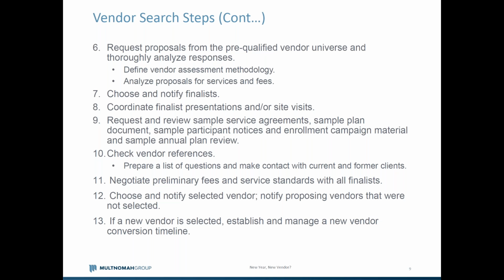At that stage, it's also important to request and review any sample service agreements, plan documents, participant notices, and some of the other materials that are important in that. Service agreements are an area of particular importance, in some cases getting your legal group involved that may not be involved in the vendor search to start reviewing service agreements to understand, if you make a selection with one specific vendor, if there are any issues that may pop up or need to be negotiated before that's finalized.